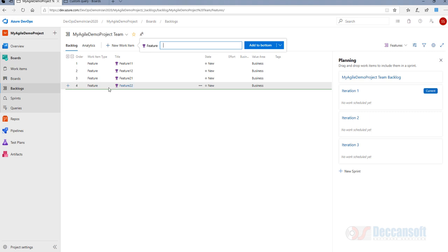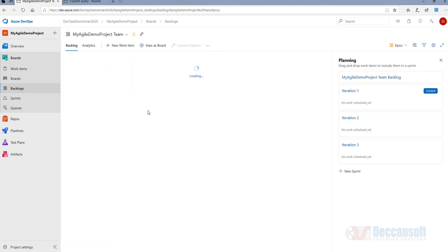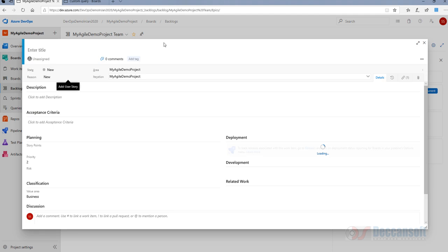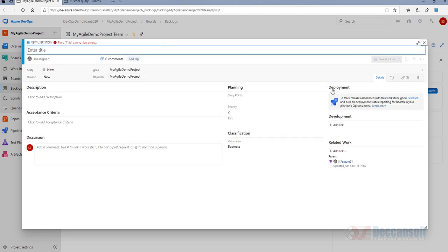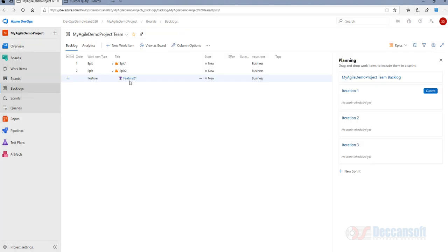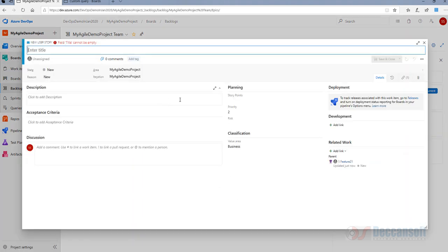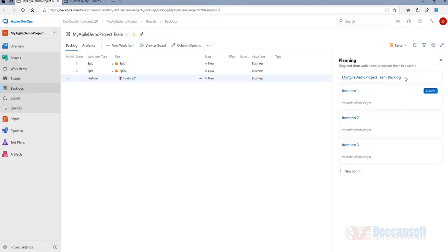But this is not yet a child. If you really wanted a child of epic 2, then what we should have done is change this to epic 1. Now see, right now this is not there. Feature 2, 2 is not there. If you directly wanted to add feature 2, 2 as a child of epic 2, use this. Or it's adding a user story. Sorry, it's not adding a feature, it's going to user story directly. But we want user story to be child of feature.